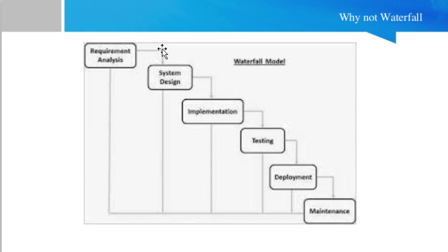Secondly, the requirement analysis starts at the early stage of a project, and then we do the system design. We get the feedback from the customer only once the development is finished. If there is any change requirement, for example the customer is not satisfied with a module, or he says that one more module or two more modules are required once he sees the system, it is not acceptable in this waterfall approach. We must do a change request.